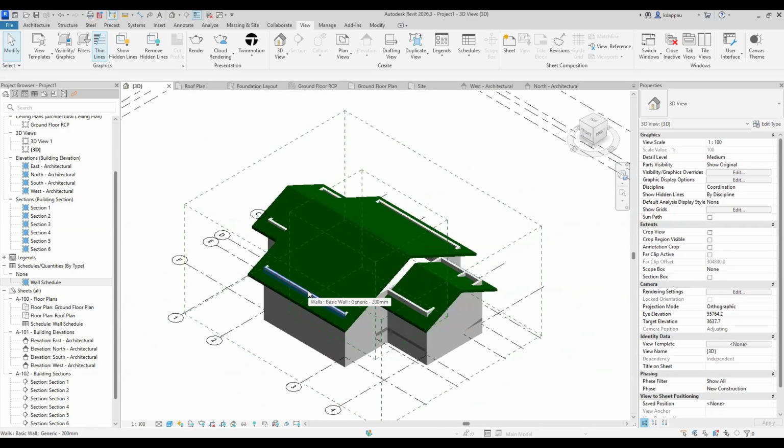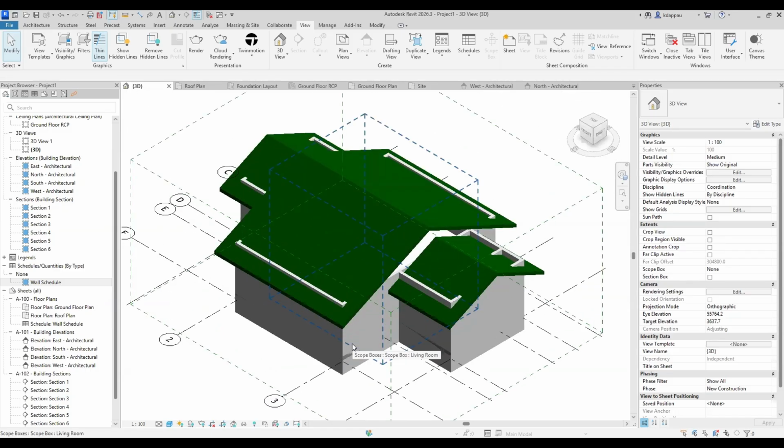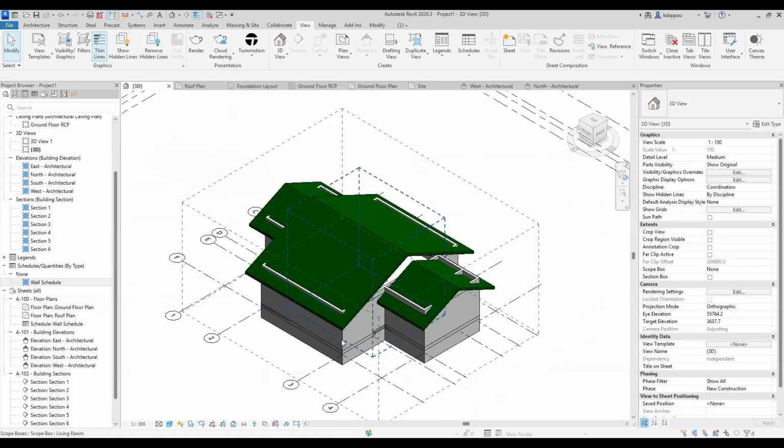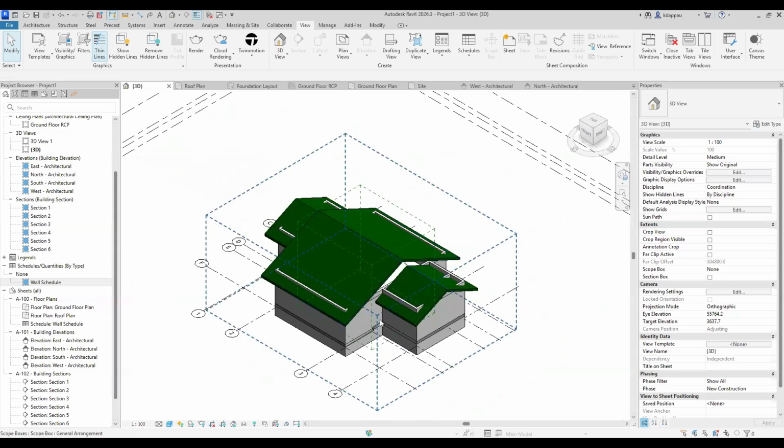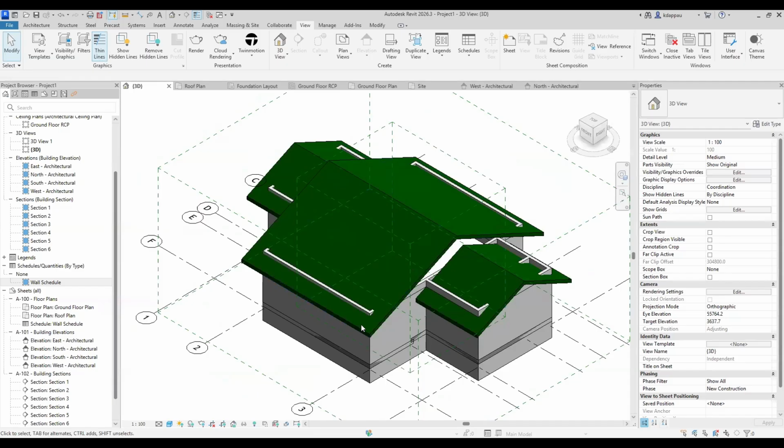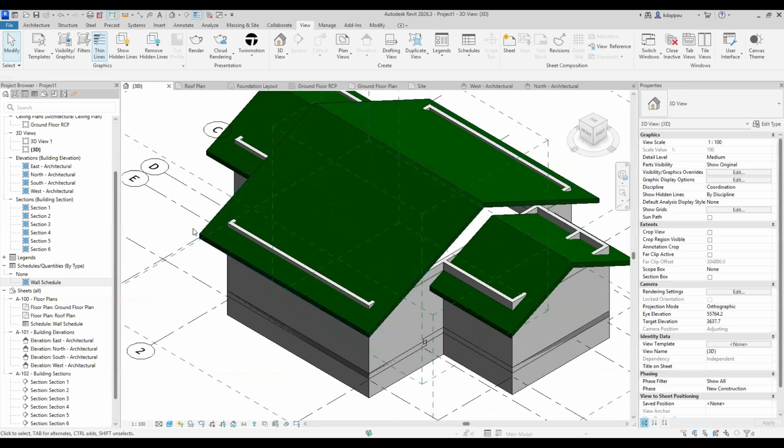It's an analytical tool that you use in a project to manage a project, to see the numbers, to see the volumes, to see the areas, to see everything. So if I'm coming to do a fascia for maybe my roof, I need to know the total length of fascia that I will need before I go and buy them. You understand? Within the Revit software, you can do a schedule for the fascia and then calculate the total length of the fascia that you need before you even go to the site to go and buy it.